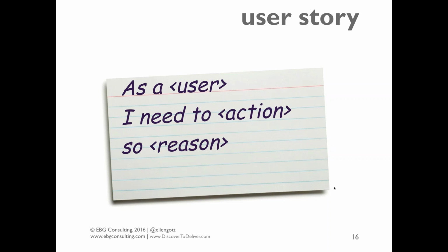So we're going back to Kent Beck talking about using telling stories. Then the story format that you see here, this template, was created by Rachel Davies and some others in the UK in the early days of XP, Extreme Programming, and then popularized by Mike Cohn in his user story book. But the idea is about telling a story to someone, and you might jot down a phrase or a noun just to remind you, right? So the story card or note is just a reminder of a requirement that you want to discuss. And it is not a requirement. User stories are not requirements.